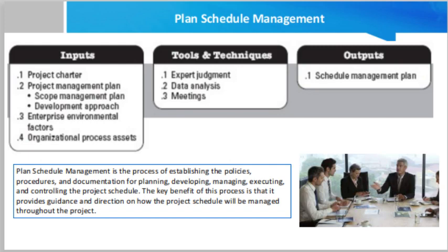Rules of performance measurement. Earned value management rules or other physical measurement rules of performance measurement are set. For example, the schedule management plan may specify the rules for establishing percent complete, EVM techniques, for example baseline, fixed formula, percent complete, etc., to be employed for more specific information for that purpose. So, these are the things we have discussed.